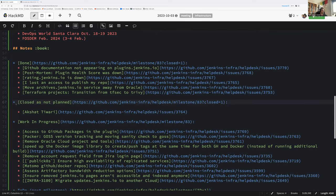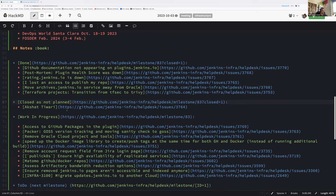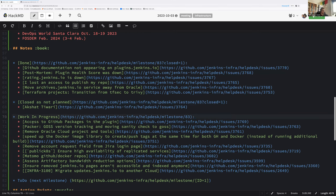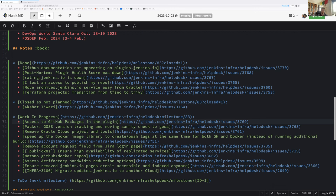We had the account issue, but the person never answered. Thanks Mark for taking care of this one. Now let's move to the work in progress, the issues that were started and we worked on during the past milestone. And for each one, we will decide if we continue working on it in the next milestone, move them to the backlog or stop working on them.